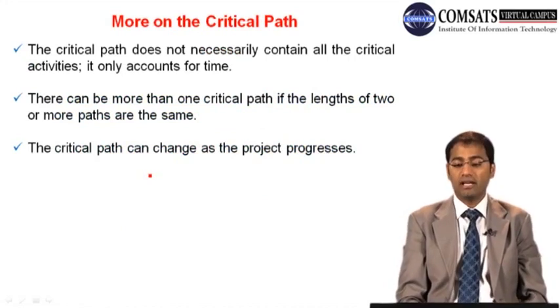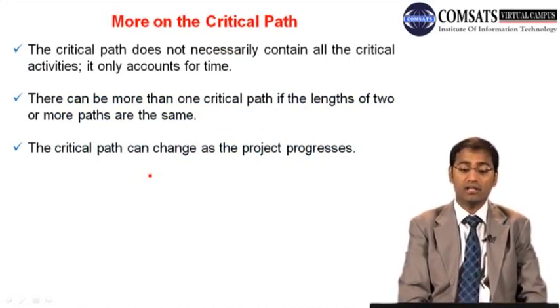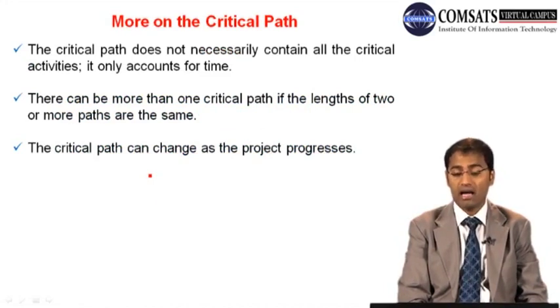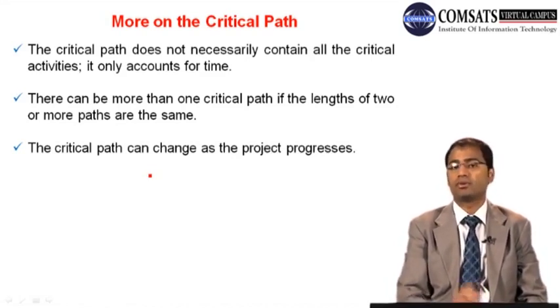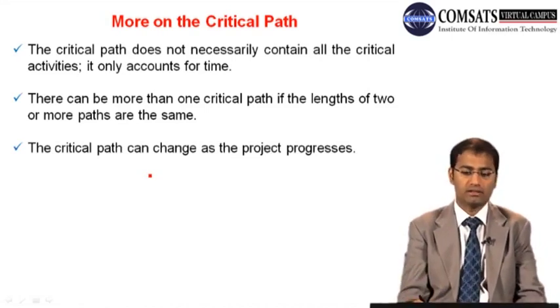So the critical path does not necessarily contain all the critical activities. It only accounts for time. There can be more than one critical path if the lengths of two or more paths are the same. Yes, that can be possible. The critical path can change as the project progresses. So we had talked about these concepts.